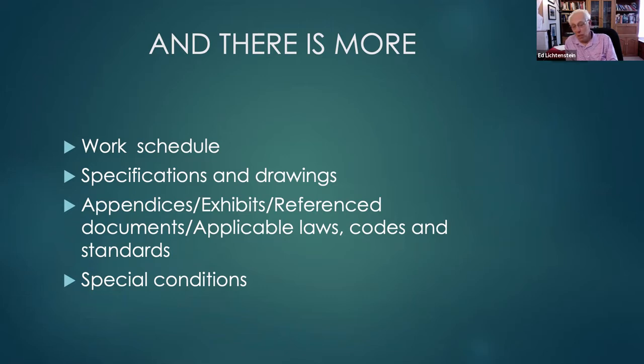Frequently it happens that the written specification may not agree with the drawing. And you should look to get them reconciled, or else there should be what's called an order of priority in the contract, so that you know which one you can depend upon.